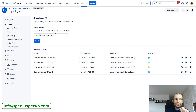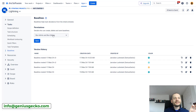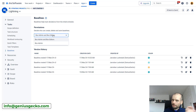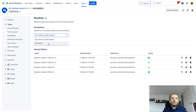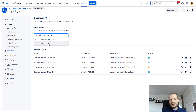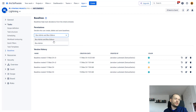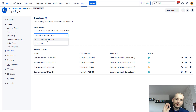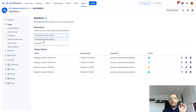Also worth mentioning is a new permissions feature: you can now decide who is allowed to work on baselines — creating them, saving to history, and so on. There are two options: Box Admin only, which is the most restrictive and prevents non-admins from editing or potentially messing up baselines, or Box Admin and Box Editor, which is a wider permission allowing anyone with box editor access to create, delete, modify, and save baselines to version history.